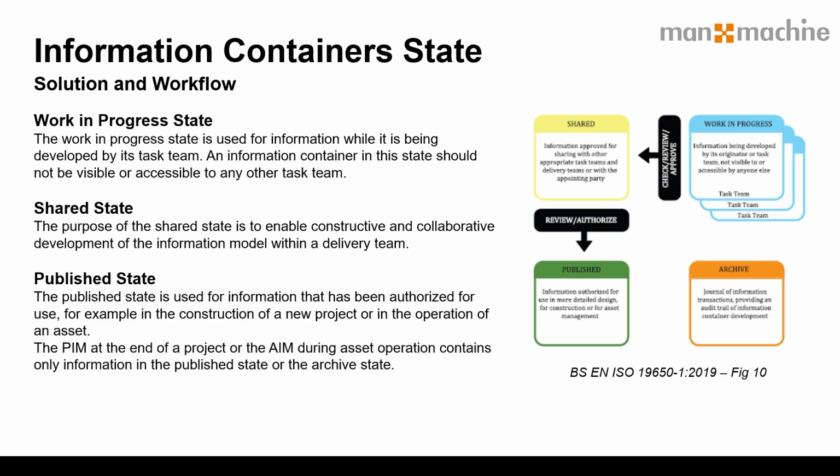So that allows, from the shared point of view, the rest of the design team to look at that information, to collaborate and coordinate the information with the rest of the design team that's on the project. And then again, we'll have a necessary review and authorisation process between that and publishing the information to the rest of the project. So in some contexts, for example, this could be agreed information for construction or handover and operational data that you may provide to the end client or operator of the asset.